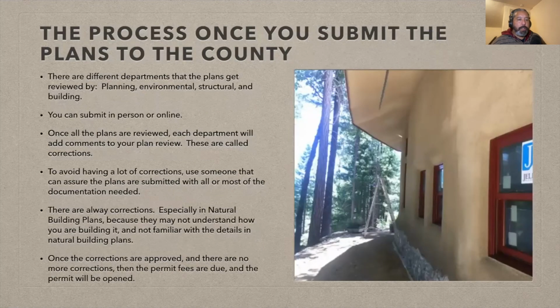The process once you submit the plans to the county. There are different departments that the plan gets reviewed by. So there's the planning, the environmental, the structural, and the building. You can submit in person or you can submit online.